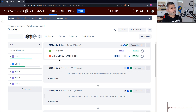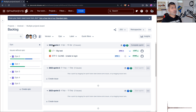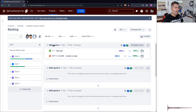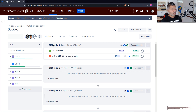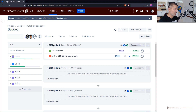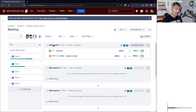One more thing I almost forgot: I always prefer not to leave spaces in sprint names, and in general when naming configurations I use hyphens rather than underscores. Personally, underscores take longer to type because you need to use Shift, whereas hyphens are quicker. More importantly, when you don't have spaces in your sprint names, searching in Jira's JQL is much easier — spaces and special characters in names can cause problems in JQL queries.